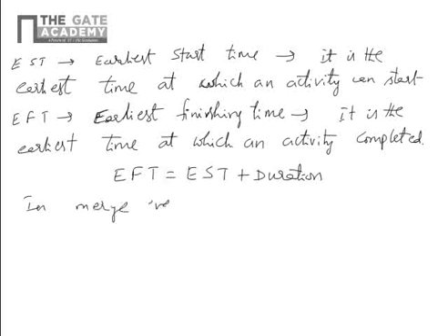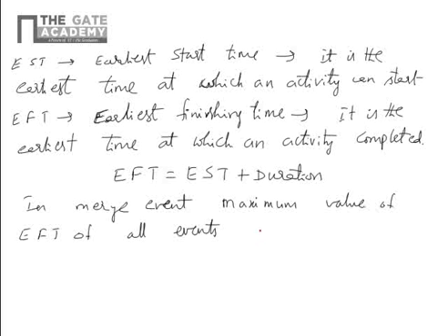In a merge event, the maximum value of EFT of all the paths is taken as the EST for the subsequent activity.